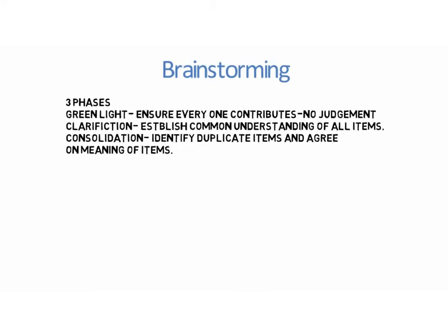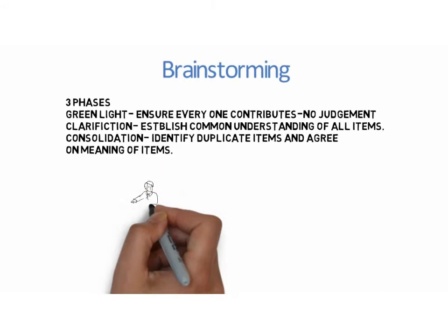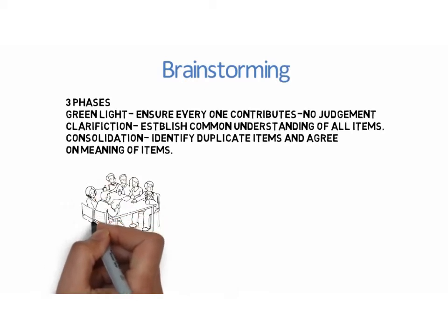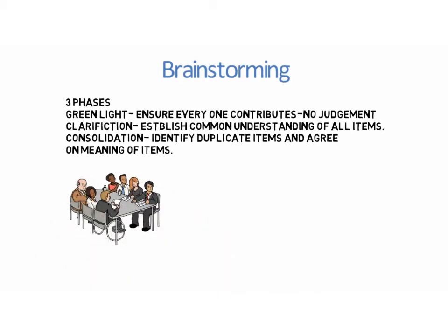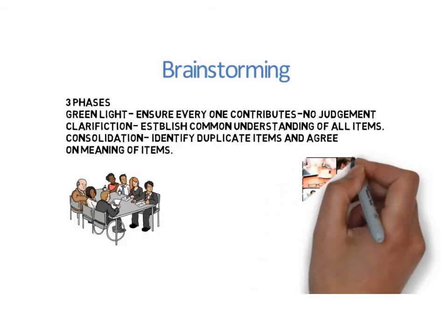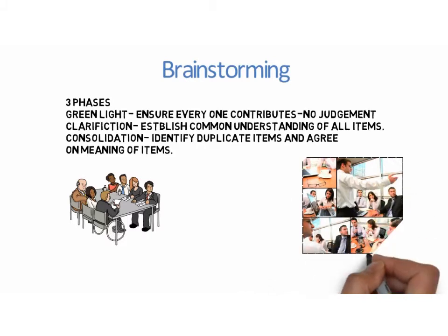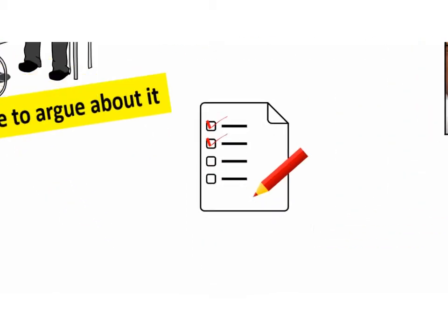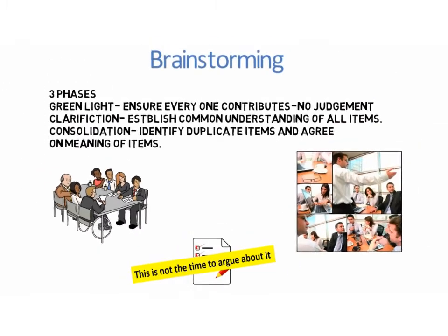It is probably the most frequently used information gathering technique. In order to get a range of possible risks, it is important to choose right mix of participants. They should include people from different disciplines and someone independent of the project. A trusted facilitator should encourage everyone to contribute. He should be fast and energetic. All ideas are posted, and there is no discussion about the ideas until after the green light phase has ended.